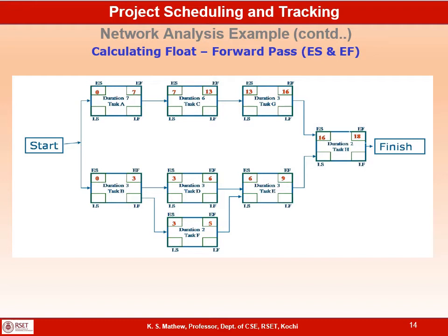Task F depends on B. Task F can be started only after B is complete. So the early start of F is equal to the early finish of B, which is 3, and the duration of F is 2. So the early finish of F is 5.